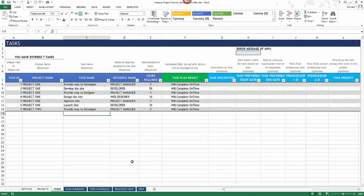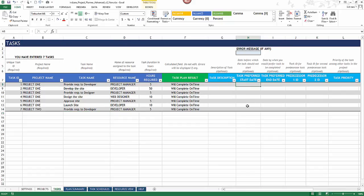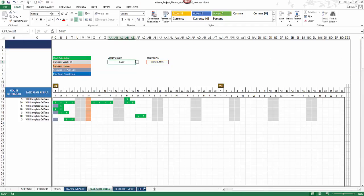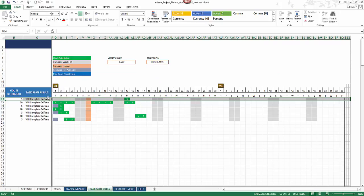For advanced features: you can set a task preferred start date. If you don't want a specific task to start before September 14th, type in September 14th. In the schedule view, that task will not begin until September 14th, though at this point it doesn't yet impact other tasks.